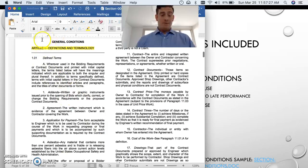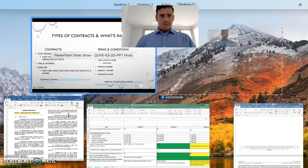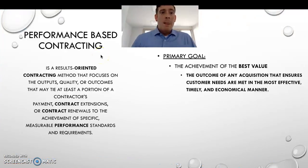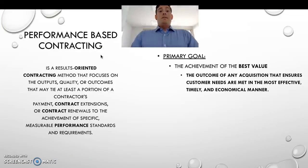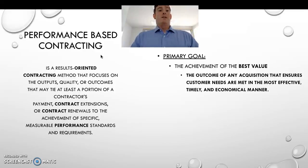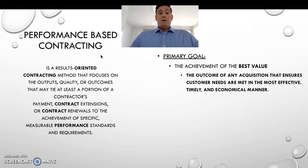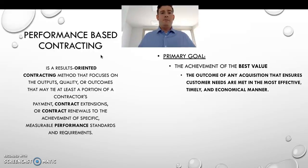Terms are again very important - what does it mean when you say contract price, agreement, application for payment - everyone has to understand these terms. Now, performance-based contracting: it's a results-oriented contracting method that focuses on the outputs, quality, or outcomes that may tie at least a portion of the contractor's payment, contract extensions, or renewals to the achievement of specific measurable standards and requirements.